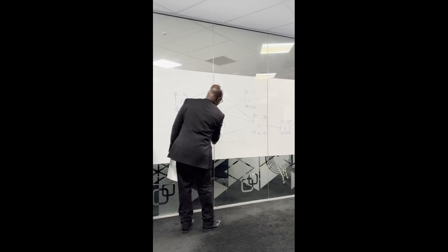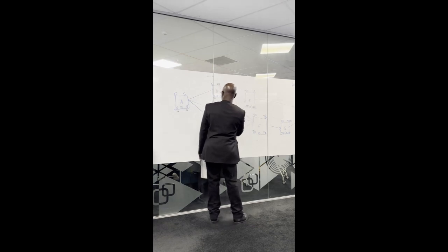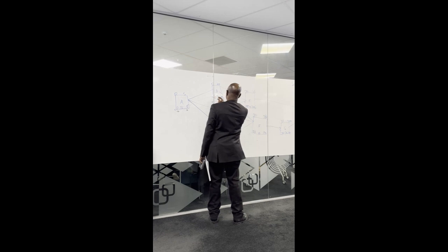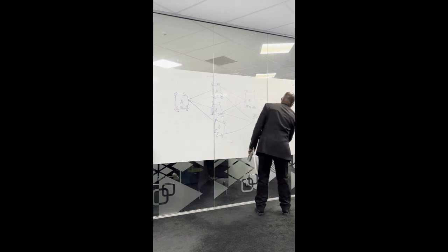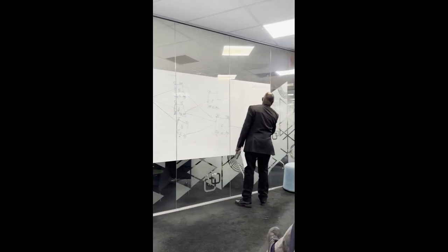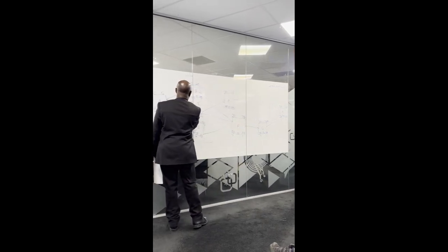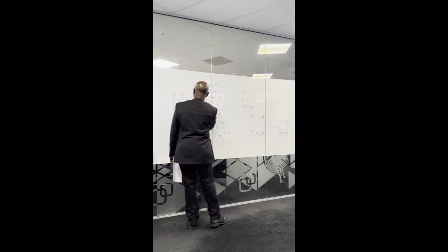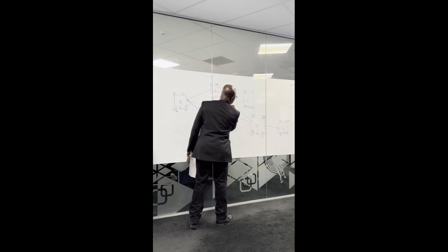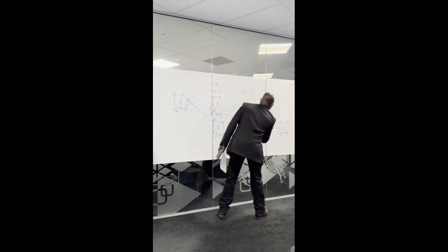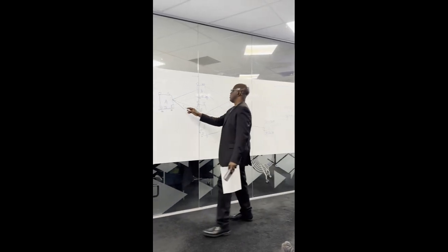Now here is the same thing, nothing, right? So we have it like this. Now this is 0, 0. This is 0, 0. This is 0, 0. So our network connectivity, what is it? The critical path will now be like this, right? Am I right? Like this. Then like this. Then like this. You can see it becomes the longest path now.